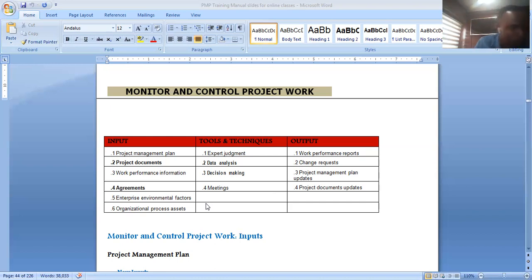It's money from whose pocket? If the client is saying that, the client should put it in writing that the client is the one mandating you to do that, because that may be in violation of the architect's knowledge. It could be in violation of the structural engineer's knowledge. So tomorrow, if the building would collapse, you have transferred the responsibility over to the client.